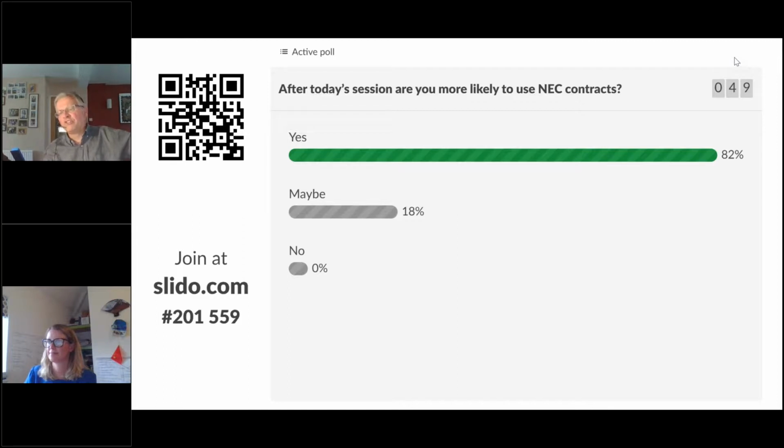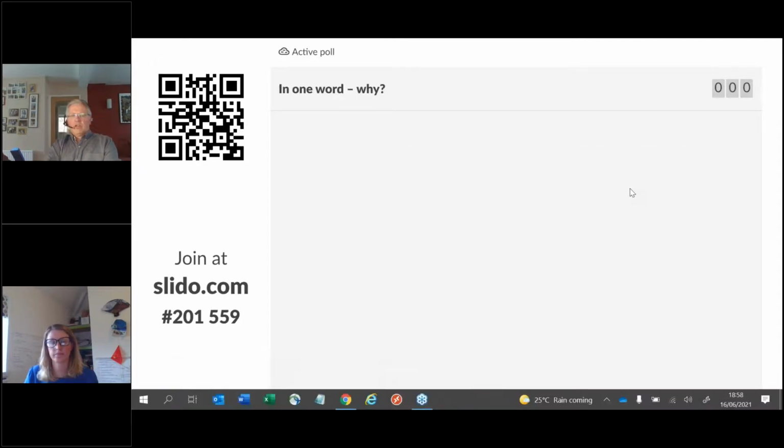Yeah, so frameworks can be set up. Basically, the framework is a structure which says this is how we want you to be able to roll out a series of projects, a series of separate contracts. Normally in a framework, if there are any particular changes to the standard, those changes are set out at the framework level and used for every separate contract that's let following. But in direct answer to your question, there's no reason why the framework could not be flexible and allow the client to use different forms of contract under that framework.